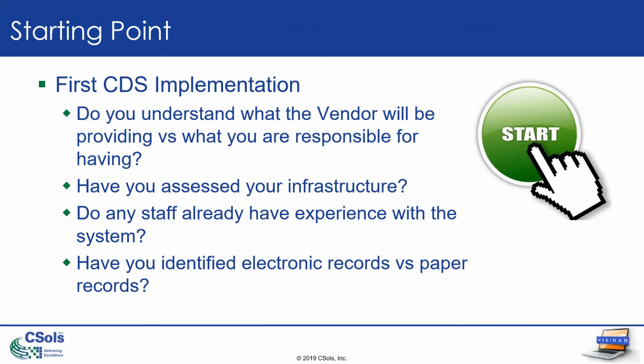But what you really need to focus on and consider is understanding what you're going to rely on as electronic versus paper, because that will drive how you do the validation to the extent of data integrity. So what you need to protect within the system when it comes to audit trails, editing, basic security, versus how to link any of those electronic records to your paper records.